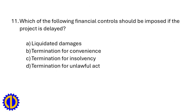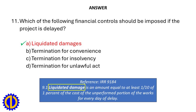Which of the following financial controls should be imposed if the project is delayed? a. Liquidated damages, b. Termination for convenience, c. Termination for insolvency, d. Termination for unlawful act. Answer: a. Liquidated damages. Reference: IRR 9184 — liquidated damage is an amount equal to at least one-tenth of one percent of the cost of the unperformed portion of the works for every day of delay.